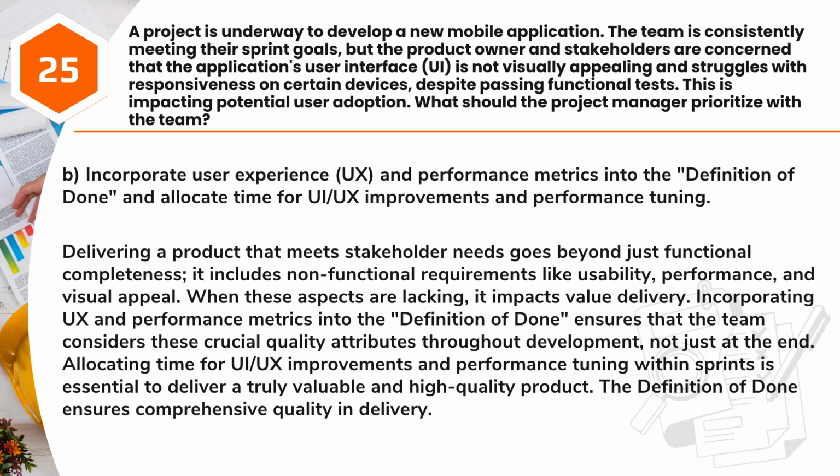Incorporating UX and performance metrics into the definition of done ensures that the team considers these crucial quality attributes throughout development, not just at the end. Allocating time for UI/UX improvements and performance tuning within sprints is essential to deliver a truly valuable and high-quality product. The definition of done ensures comprehensive quality in delivery.